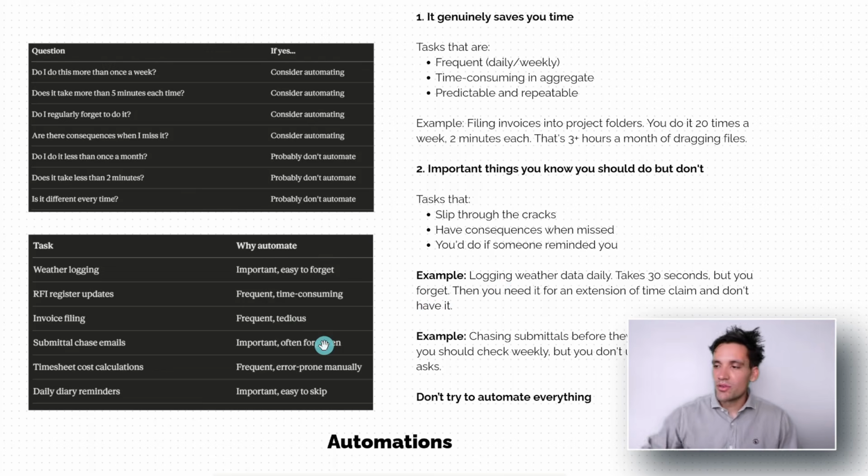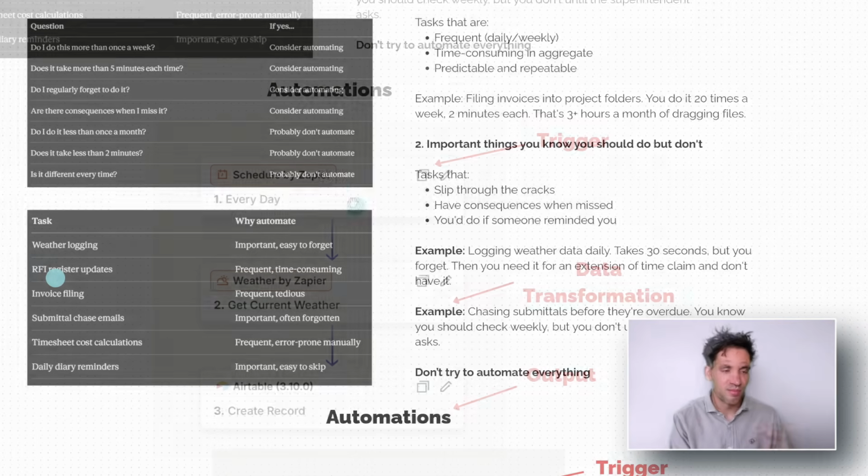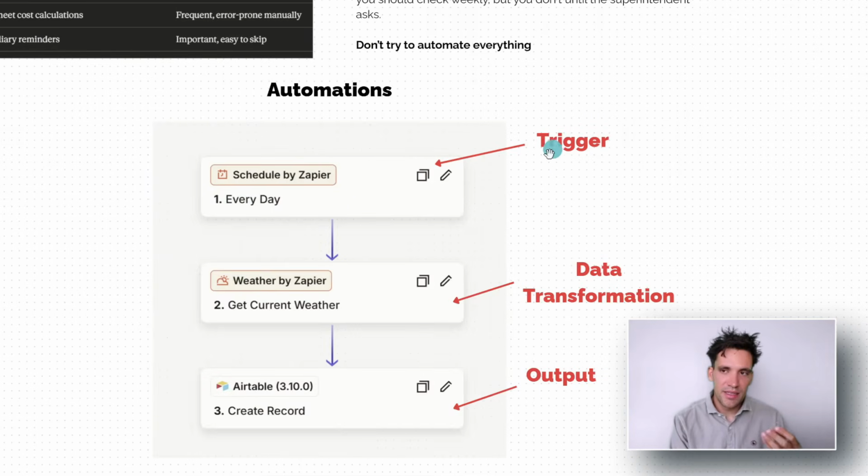Even things like you have a cost tracking spreadsheet for the project. All your labor hours go into QuickBooks, taking the hours in QuickBooks and using that to update your cost tracking spreadsheet automatically. So you get a nice cost report and can generate insights and look at cost codes that are flagging as overrunning. It's something you should be doing. It's something that the perfect project would be doing, but you probably don't have time to sit down manually every week and do.